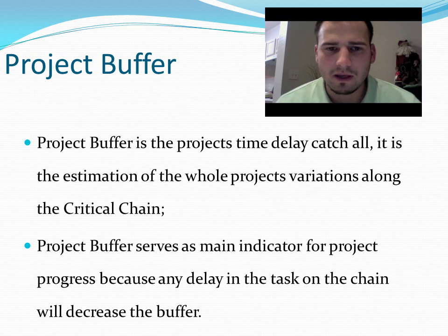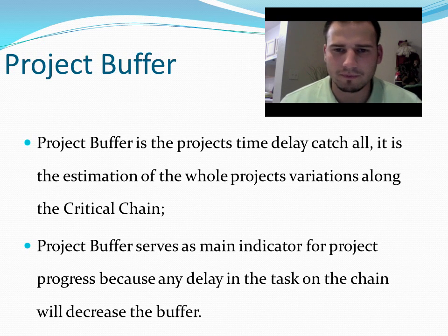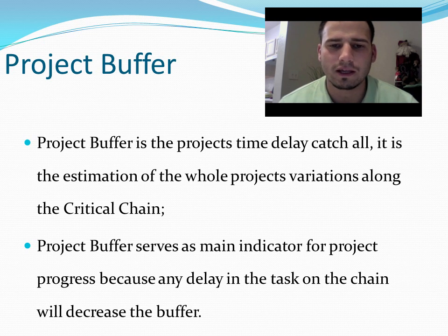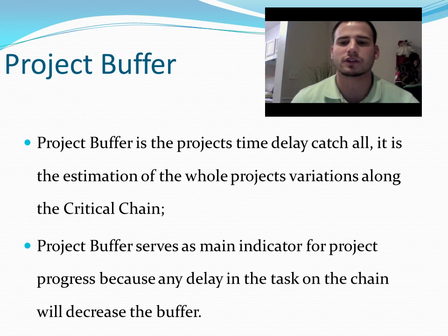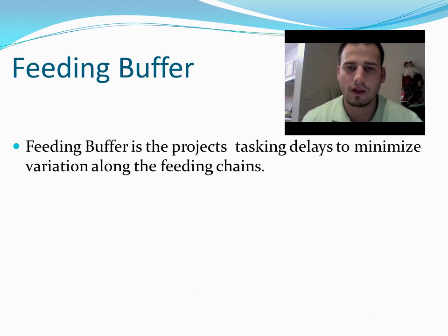The project buffer is a catch-all buffer. This buffer is placed at the end of the project, and its sole responsibility is to mitigate all risk across the entire project. The buffer allows for a project to be set for a specific date beyond the estimated completion date. This allows any company to use this buffer time to incorporate and integrate all of its project's designs.